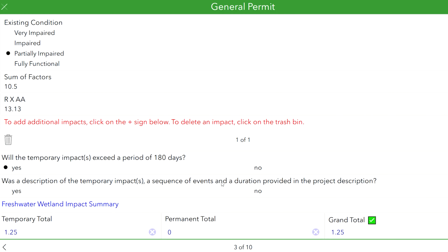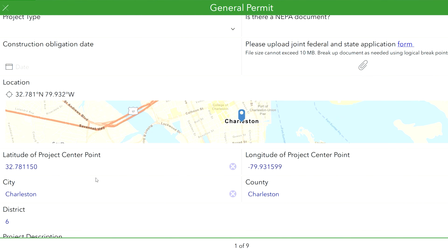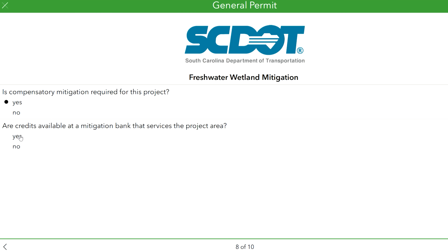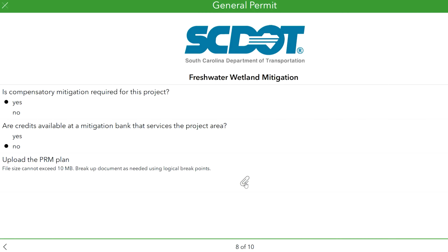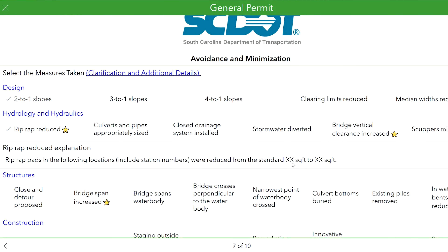E-permit provides built-in quality control checks; form fields are auto-populated based on project information, and users are prompted to answer questions or upload required documents based on selected answers. Through coordination with USACE, the avoidance and minimization section has been enhanced to address components that SCDOT had not previously highlighted in prior submissions. This addition of a simple checkbox ensures that SCDOT shows all possible avoidance and minimization measures. Beta testing of the e-permit application has generated very positive feedback from SCDOT internal users, consultants on contract, USACE, and other state DOTs.